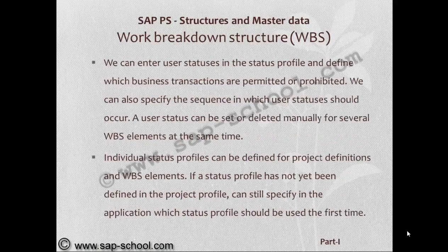We can enter user statuses in the status profile and define which business transactions are permitted or prohibited. We can also specify the sequence in which user statuses should occur. A user status can be set or deleted manually for several WBS elements at the same time. Individual status profiles can be defined for project definitions and WBS elements.